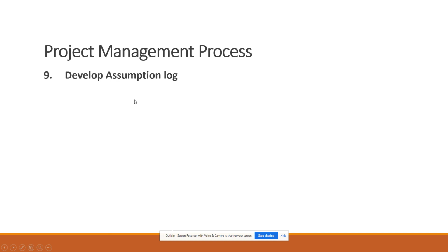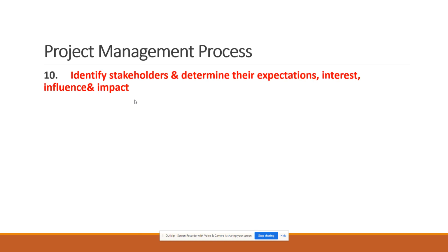So developing the assumption log is a part of the initiating phase. That should be kept in mind, but it will be updated throughout the project. It will be in the planning phase also, in the executing phase also, and in other phases also. But developing the assumption log is in the initiating phase.